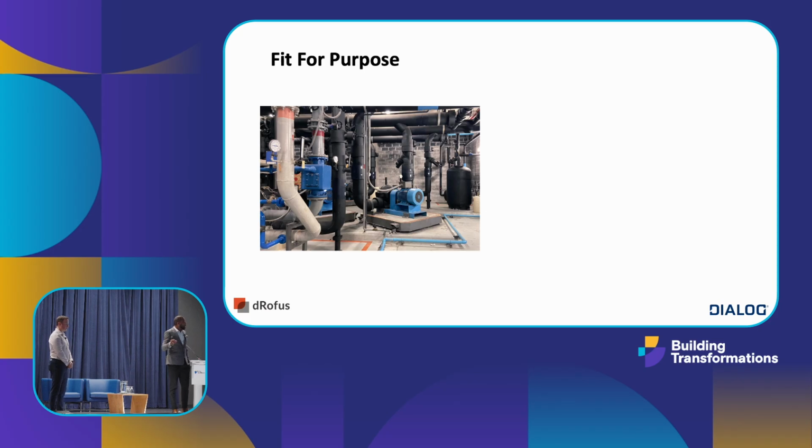Asset tracking? Yeah. So what you're seeing there inside of a mechanical room is a bunch of assets that need to be maintained or can be replaced. So it makes sense to have information about, perhaps, an ID for that piece of equipment, knowing when something was installed, knowing what systems it's connected to. I think we had some discussions earlier this morning about the patient on the table and something being disconnected without realizing that it's actually impacting an OR room that's being used, right? So it makes sense to have the COBie information for this.